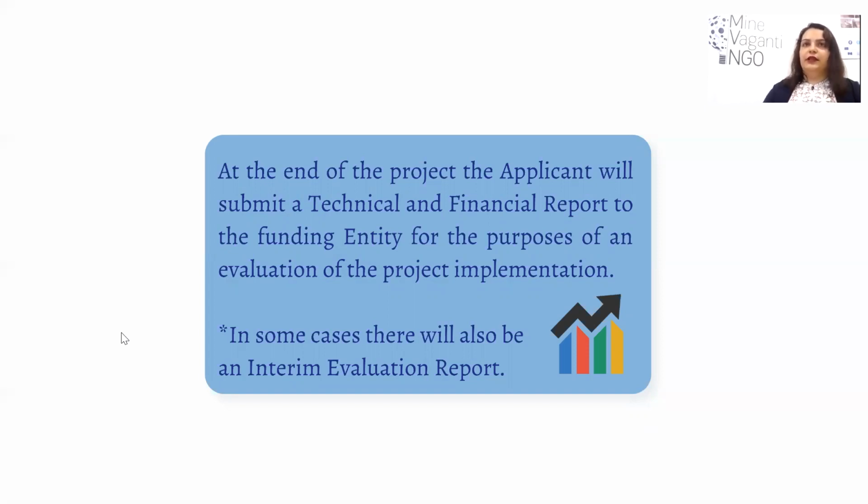So after 1 year or 2 years, depending on the period of project implementation, let's say in the middle of the project, you're asked to do an interim report. Then the entity that is managing the funds will check on you. So it is for this purpose that I told you previously that it's really, really important and necessary to keep track of all the things that you're doing during the project implementation.